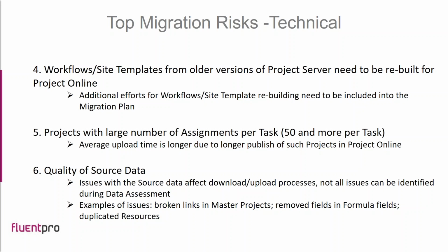Also, we observed that for projects that have a large number of assignments per task, like 50 and more per task, the average upload time is longer when you upload projects to Project Online, just because the publish of the project takes longer, as the process is processed longer in the queue. So this should also be taken into account when you create your migration plan.